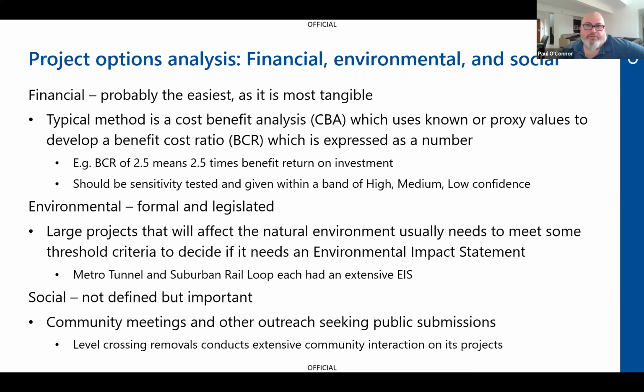So what you would try to do then is derive, you may also use cameras to work out how many occupants are in each vehicle. And so you might end up getting an average of 5% of vehicles have more than 3 passengers. You might want to segregate out light commercial and large trucks from commuter cars. So there's a couple of ways you would do that. And so you would need to spend a bit of time to understand that baseline.